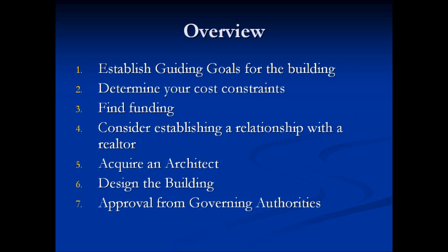So, the overview: we establish guiding goals, determine cost constraints, find funding, establish a relationship with a realtor, acquire an architect, design the building, and we could also add design the experience and design the brand, and gain approval from governing authorities. So this is the overall process. We first look at guiding goals.